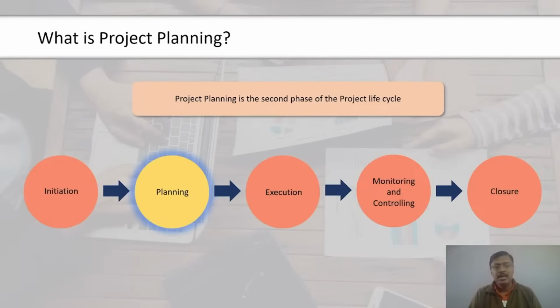As I consolidate upwards, at the ultimate consolidation level, the top level, I will have the overall budget, the overall schedule or effort, the total resources required, and what the activities involved are. So once we have this consolidation, we can easily look at the effort involved, the budget involved, and further we can optimize. So that's where work breakdown structure is very essential.